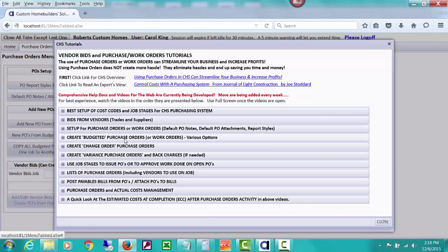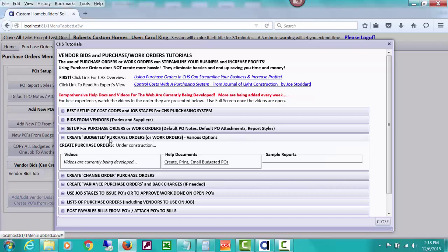In this video, we are going to talk about creating what is called budgeted purchase orders. There's three types of purchase orders or work orders that you can create in CHS. One is called budgeted POs. In other words, they relate to the budget. They might be a little over or under the budget, but they're called budgeted because they're authorized what you're planning for. And they will affect your estimated cost at completion and show you how that changes if you do a PO for a little more or a little less.